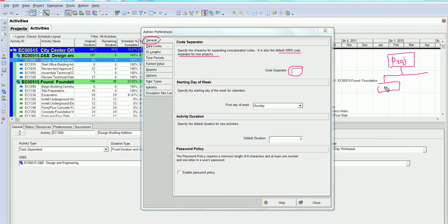Let's say this is phase 1. This is activity 1. So as you go down, it's called separator. Let's represent this phase as A. Just representing. How would you represent it? Let's say it has an ID A. So going down, I would say A.1. Why did this point come? Because of this. This is called code separator. I hope this is clear.